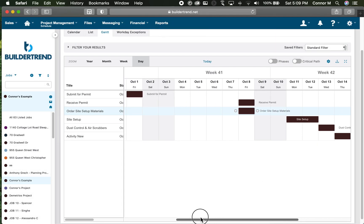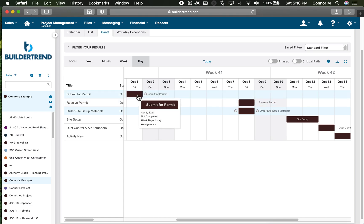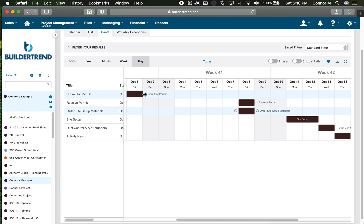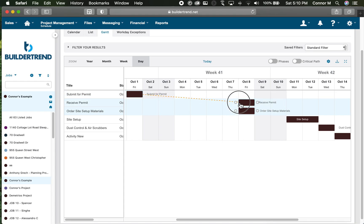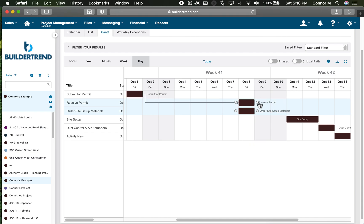Adding relationships: we talked in class about different types. The most predominant one is going to be finish-to-start and start-to-start in BuilderTrend. To do this, simply mouse over the activity. It's going to display two balls on either side. If you're doing finish-to-start, so submit for permit, you're going to finish that activity and receive permit starts from the previous one finishing. You grab that ball and just connect it to the beginning of receive permit.